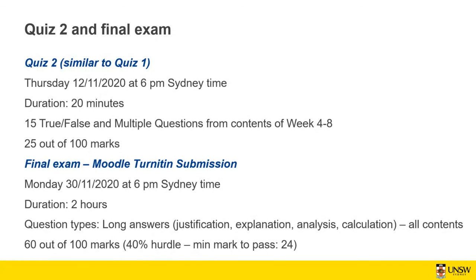Won't the extension of a schedule time affect the ETC and EAC? So the earned value, it means that your project is going to be extended. Based on the ratio between the earned value and actual cost, you get the ETC and EAC. Okay, so it's already included in the calculations.